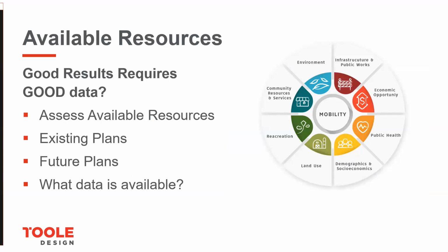The next step is something that a lead agency may not consider as an important step. The amount of available resources will dictate the breadth and depth of the active transportation plan. So good results require good data. For a consultant to prepare a robust analysis to inform and support the recommendations, they will need the lead agency to gather this data. One of the first things that I provide a lead agency during their kickoff meeting is a data request checklist. So we can assess the amount of work already completed and the data available to us to better understand how much we need to invest in the information gathering and existing conditions elements of the plan.